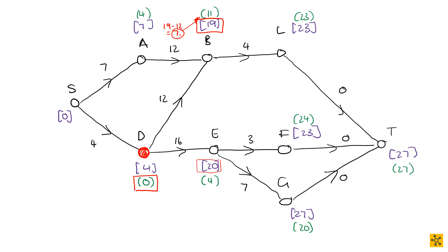In E, it's 20 minus 16 — that gives us 4. So E is critical. Then we can look at F: 23 minus 3 is 20, and 20 is not equal to 24, so F is not critical. Then we can go to G, and 27 minus 7 gives us 20. The latest start time for G is 20, so G is critical.